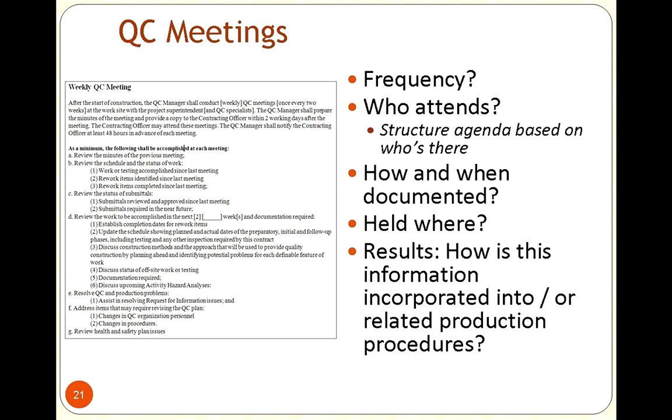And a lot of this was to not just document it, but if a contractor came up and said something, and I was pretty sure in a previous meeting they said something different, we kept a journal of all the minutes. So we just had a tape recorder. We kept a tape recorder in the meetings. I was fortunate enough to eventually get an administrative assistant whose duties included documenting the meeting minutes as much as she could. We gave her about a 5-day period, 3 to 4 work days, to get the minutes out.